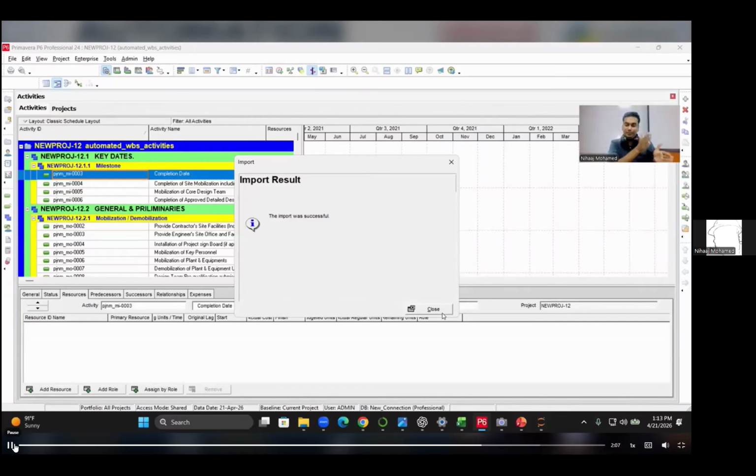But you want to prepare the initial file, and after that you want to take out all the WBS file, and then you want to make the parent columns, name those parent columns, and upload it to the P6. Again, you want to export it to find in which way the WBS name is, and then according to that, you want to make the new activity names and WBS code, and it's 1,000 projects. Can you imagine that? You use the VLOOKUP and all the stuff, and after that you find the activities, and then you want to export it to the P6.